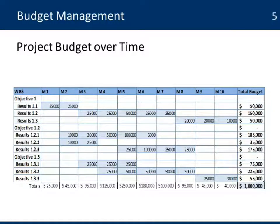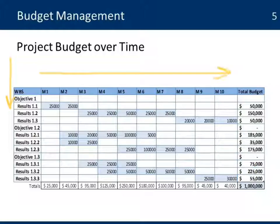One of the tools you can use to help manage your project is to make sure that you have a distribution of your budget over time. Like in this example, we have a list of all our activities in the project — in this case, we are looking at levels of results — and then we see the cost that you will have to incur on a monthly basis. In this example, we have a 10-month project at a value of $1,000,000. You identify all the costs you have every month, and that will be your baseline.